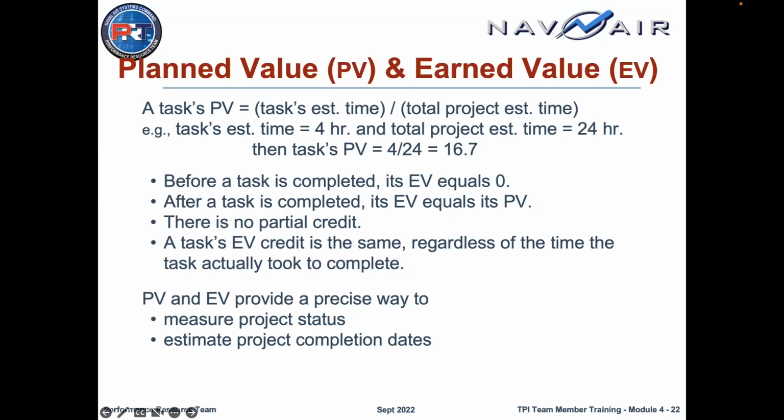So Brad, or excuse me, David, you said finish the project. I assume you meant finish that task, then you get all of the value. That's right. Finish the task, sorry. And if you use planned value and earned value, then you have a way of measuring where you are in your overall effort and estimating when you will be done.